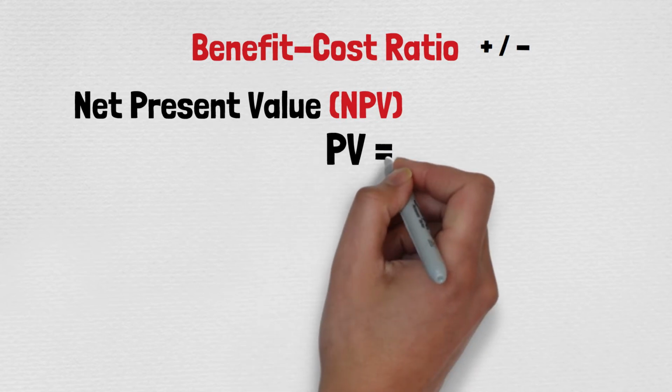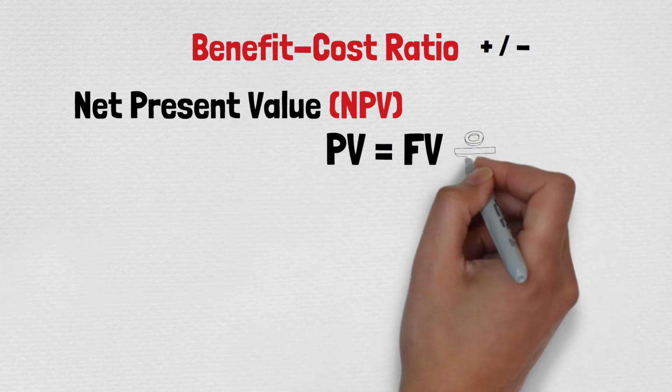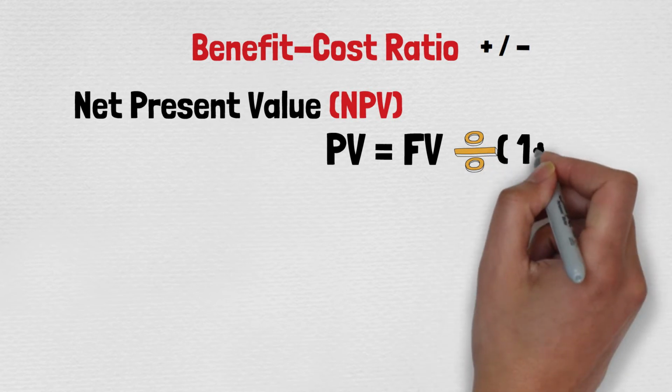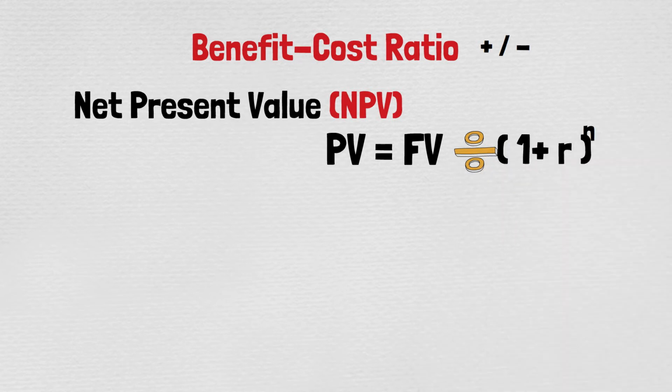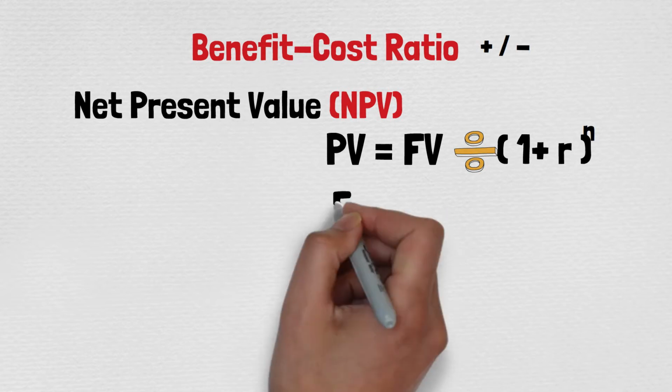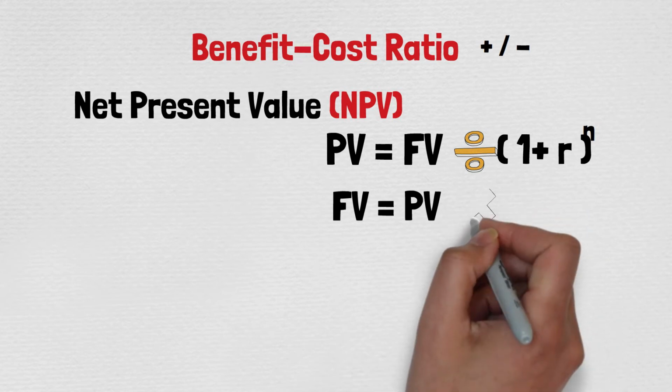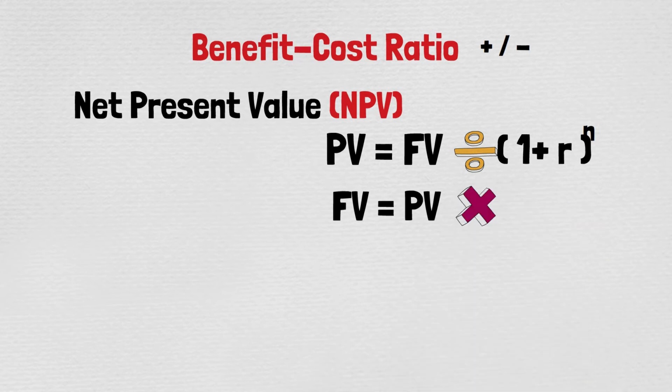And the most important thing with cost is the NPV, net present value. There's only one simple equation, guys. In here, N represents the number of years, R represents the interest rate. You can twist this equation around if you want to calculate the future value. This is the only equation you need to remember to do all the calculations with NPV.